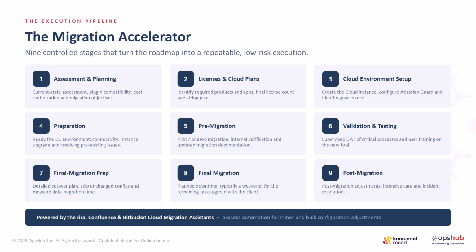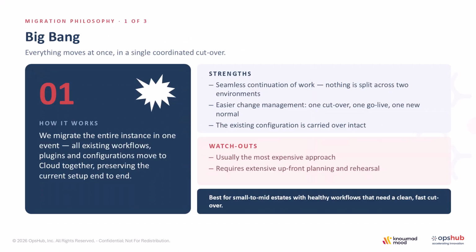Next one, please. So how do you do this? Well, three ways of doing it. Traditional ways, simplifying. The first one is big bang, okay? We prepare everything. When we have everything done, we just stop, make the migration, run all the scripts, all the programs we have for moving the information to the destination, and start running the processes in the new one.